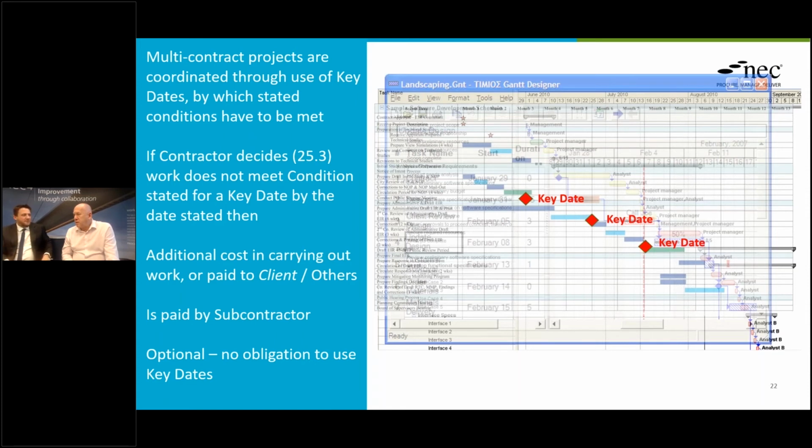And actually, I know it's slightly off topic, but I think it's always important when we're putting dates on to remember their reality pairings. So we wouldn't put a completion date on there without a planned completion. We'd have a completion date, and then we'd have completion when we get there, and before we get there, planned completion. That's really important, because you need to know what that terminal float is. And no less important for key dates.